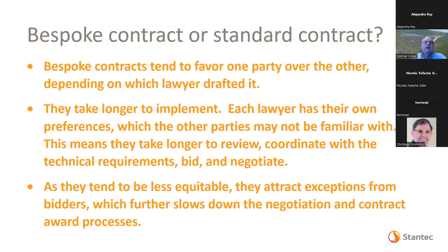Bespoke contracts take longer to implement. Each lawyer has their own preferences, which the other parties may not be familiar with. This means they will take longer to review, to integrate the technical requirements with them. To bid, everybody's got to get up to speed on custom language instead of standard language, and negotiate.